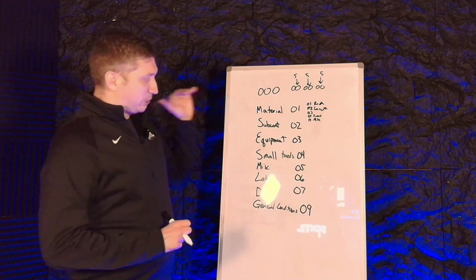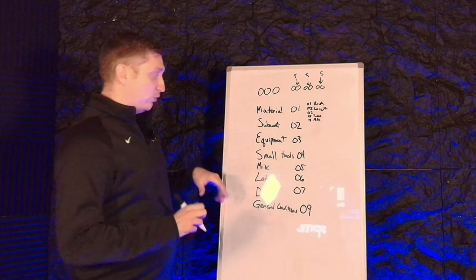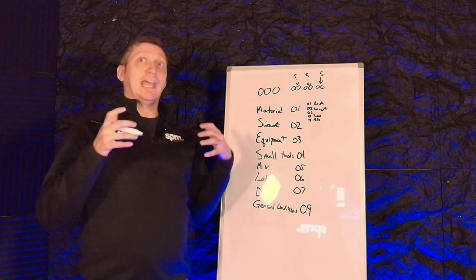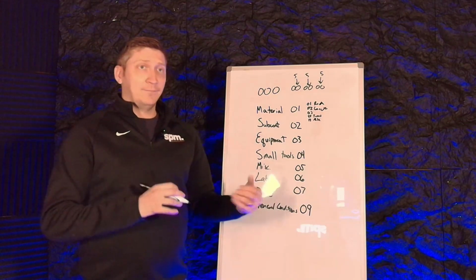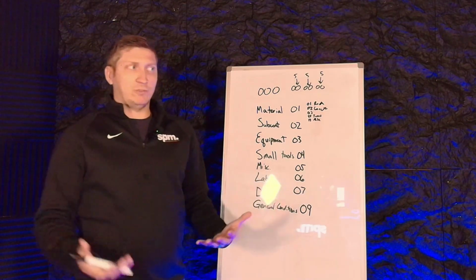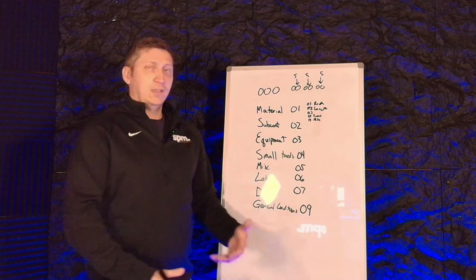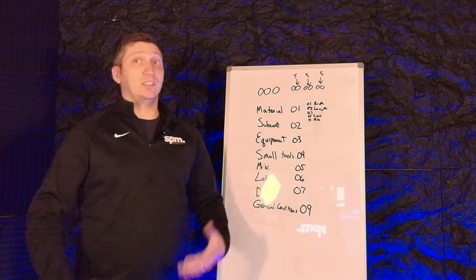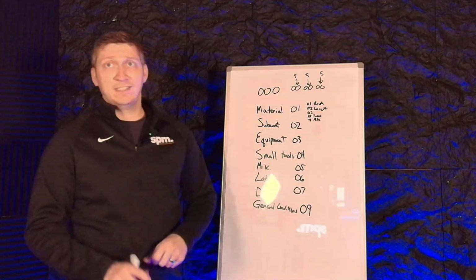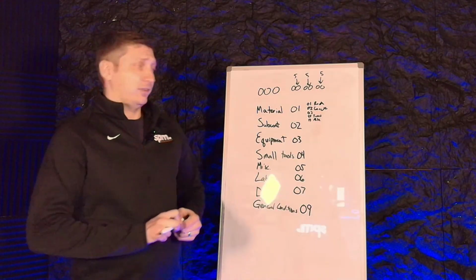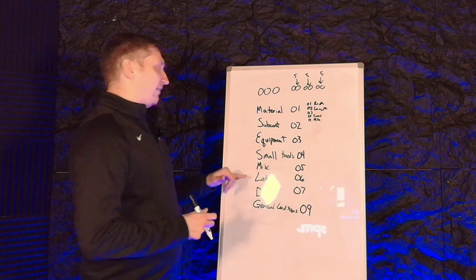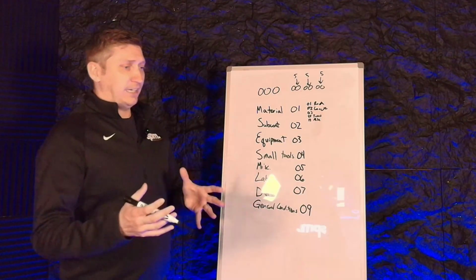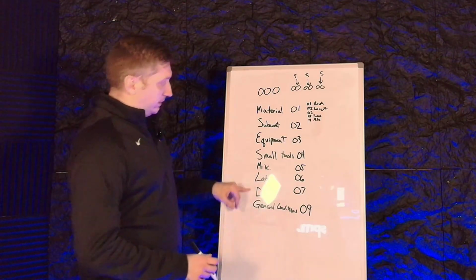We want to make sure it's tracked exactly the same so you can see if you're going over budget for the next one. Super important for labor because it helps you catch problems today in maybe a 2-year project. If we're not doing well on underground, we're clearly going to have to try to make it up in the other portion. Otherwise, we're going to just be stuck with a big loss, and we won't even know it until we get there later. But when you track it every month, it gives you time. You get the data fast enough and you can fix it.